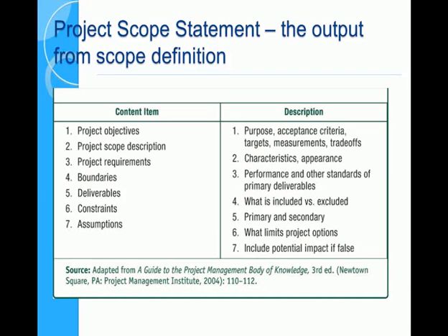Constraints and assumptions we covered in the class. We looked at constraints as either physical, the backyard is only so big, so we couldn't have a patio that's larger than the backyard, or because of the way the orientation of the house, then the patio needs to go on this plot of land. Whatever it is, it's physical, or it could be regulatory, meaning that because the structure is higher than the fence, it must be at least 1 metre away from the fence. That's a constraint.